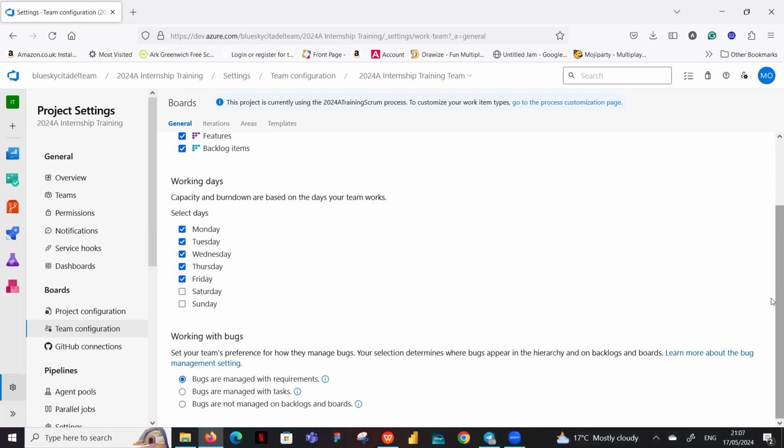But what we're saying right now is by choosing the first option, by activating that first option, what we're saying is, as a QA, once the developer finished working with the story, they've developed everything they need to do, the story comes to you. And what you're doing is looking at the acceptance criteria, like I said, and running a test. When you're running your test, you find that defect and all that. Against that story, let's assume that story's ID number is 101.